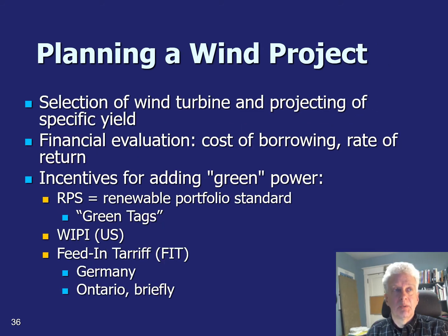So in planning a wind project, you would go through the selection of the specific model of wind turbine, make a projection of how much specific yield that model of wind turbine will do in the site you're looking at. Then you can do a financial evaluation looking at your cost of borrowing and rate of return. You can also then factor in some financial incentives that have been available in policy conditions. So there are several different jurisdictions that have approached this differently.